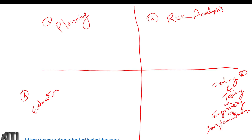Let's start with the planning phase. We receive requirements from the client. In the planning phase, the BA works with the customer to gather requirements, and together with the project manager they estimate the project and do complete planning. Let's say we have divided our requirements into different modules and right now we are working on module one. After planning, we move into risk analysis for module one.